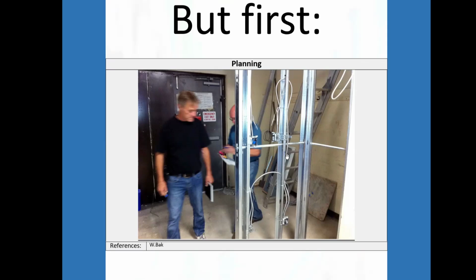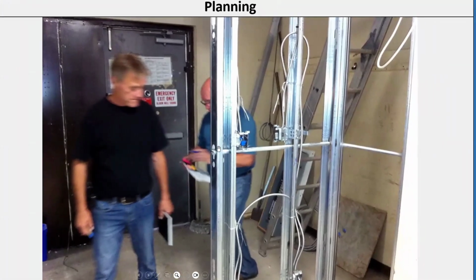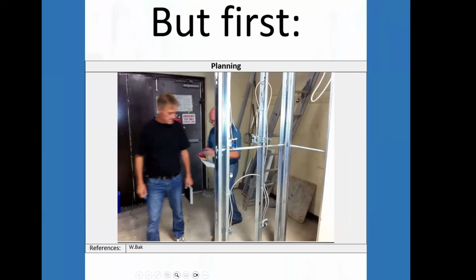You walk through the whole facility. Now this survey took us about an hour and a half of going through all the floors, finding on the drawings that we got where all the destinations are going to be, checking out the main home run location, which would be the communication closet, and trying to foresee any kind of challenge that we can encounter in order to price the job properly. Right? So, can you recognize the person in the background here? Some of us will. All right.